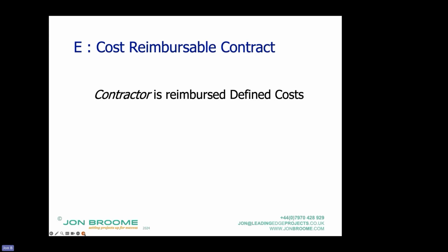Yeah, no, it doesn't. The contractor is in charge of its subcontracting arrangements. They might be under an option A, but the subcontractor might be under option B, because the subcontractor says, I'm not taking the risk of quantity variation, in which case the contractor goes, right, okay, how much risk should I add in?